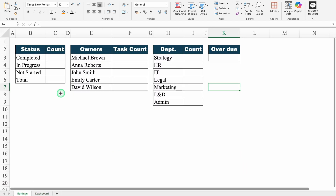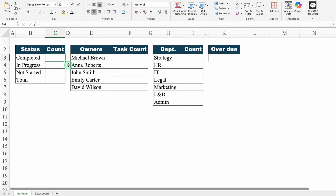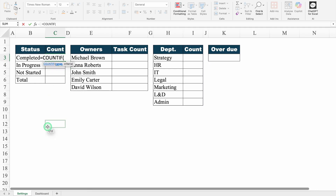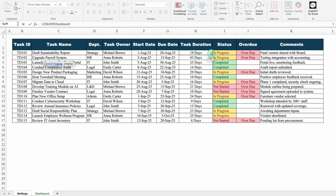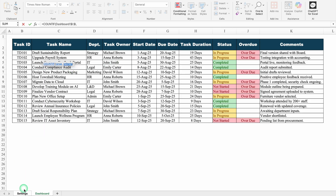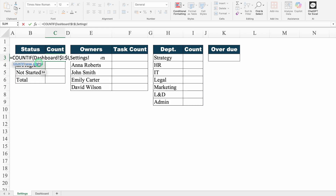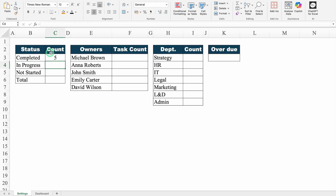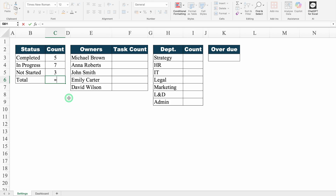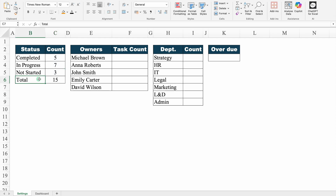Now let's come to the Settings sheet. We will insert our formula here. For Status — Completed — I will use the COUNTIF function. Equal to COUNTIF, bracket open, Range: I will go to my dashboard and select the entire Status column, press F4 one time to lock the range, comma, Criteria: I will go to the Settings sheet and click on the first status. Close the bracket and hit enter. We got total count as 5. I will drag down till 'not started'. For Total, I will use SUM — equal to SUM, bracket open, select from top to bottom, close bracket, hit enter.